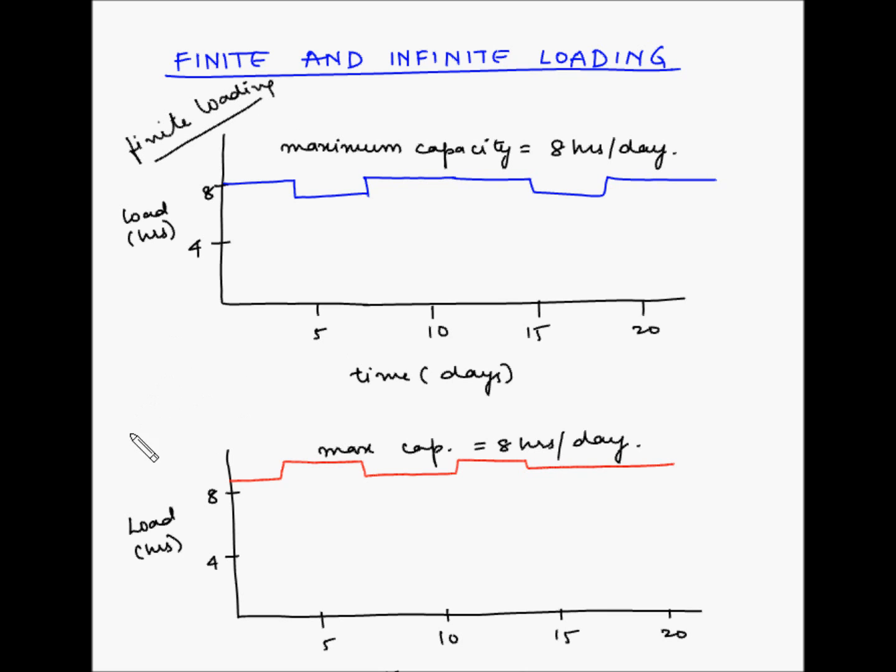While the second one is for infinite loading. Now, the infinite loading scenario generally happens when you have some orders which have been delayed and hence you want to catch up, or when you have more orders than the capacity and still you want to deliver them on time, so you overload your resources.